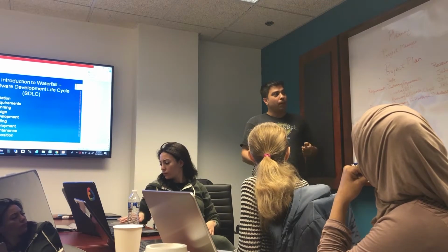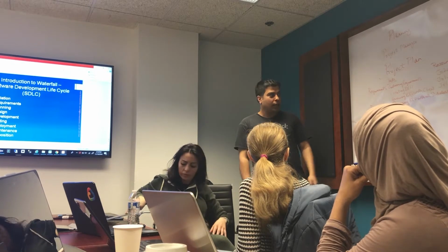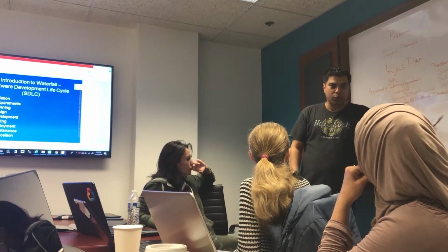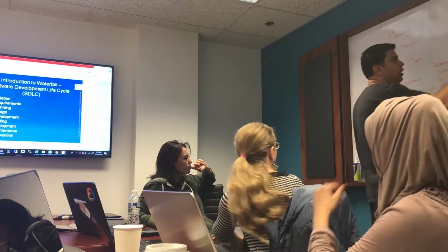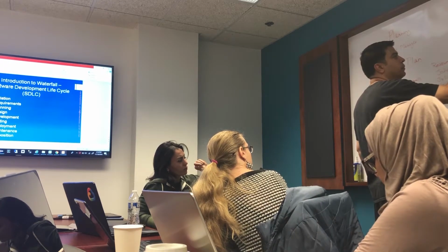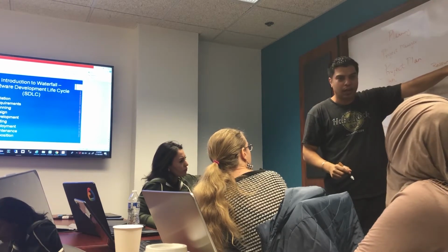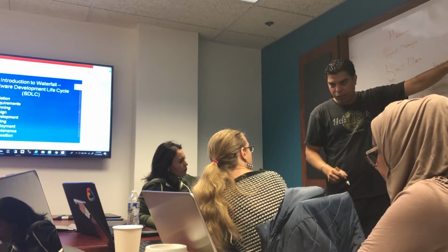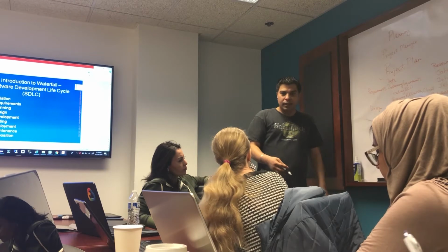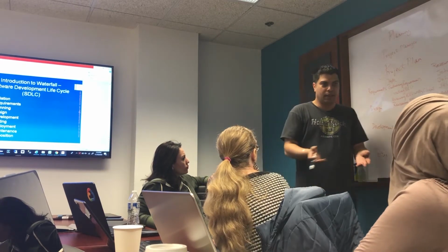Okay? So project manager's other role is, once the project starts, gets kicked off, keep a track that these tasks are completing on the timeline. So what they do is, they can add another column called the start date and the end date. Okay, start date and the end date. When did you start and when did you end? Okay, just to keep track that it's around the same timeline. And if it's not being done, then the project manager will either ask question to the resource or ask their manager that why is it taking a long time.